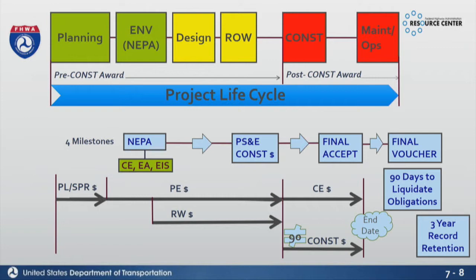So, you know, your auditors might have to go out and do some audits on consultant agreements, or maybe there are still some other construction things you have to do, like punch list stuff. I'm not sure, and maybe some engineers can tell me, is final acceptance before or after the punch list stuff? After? Okay, so maybe that's not an issue. But just remember, you have to build in the additional time from final acceptance until you're actually going to close out the project. And that's where you have to really identify what those extra activities are.